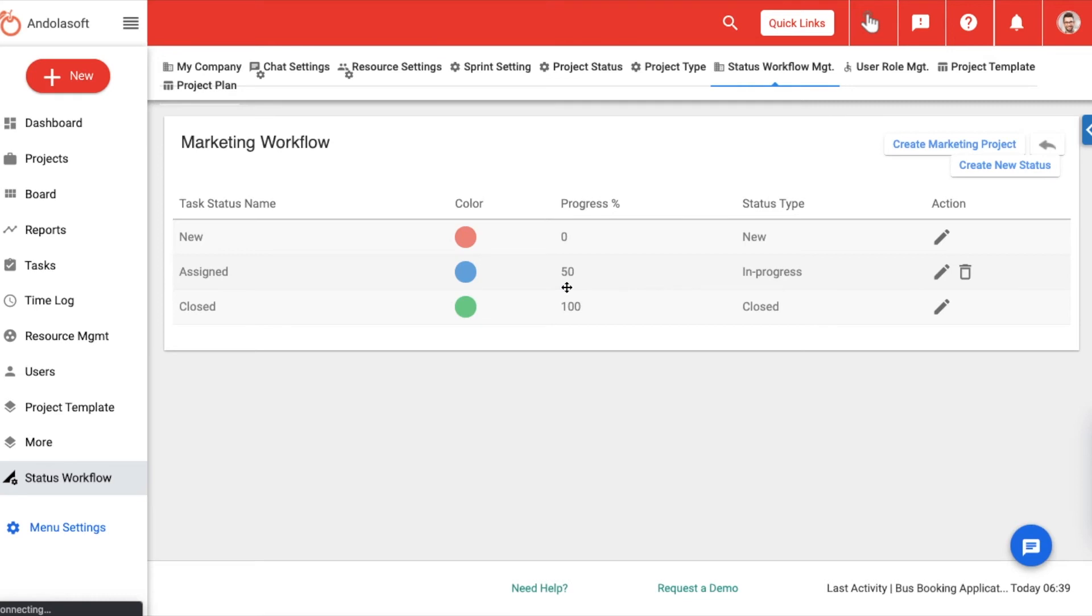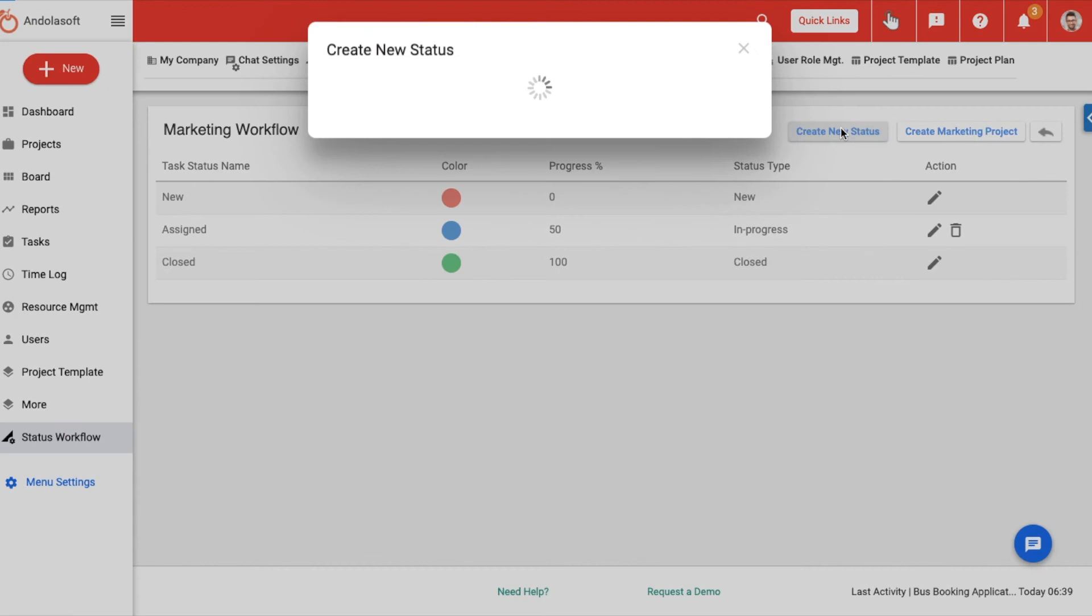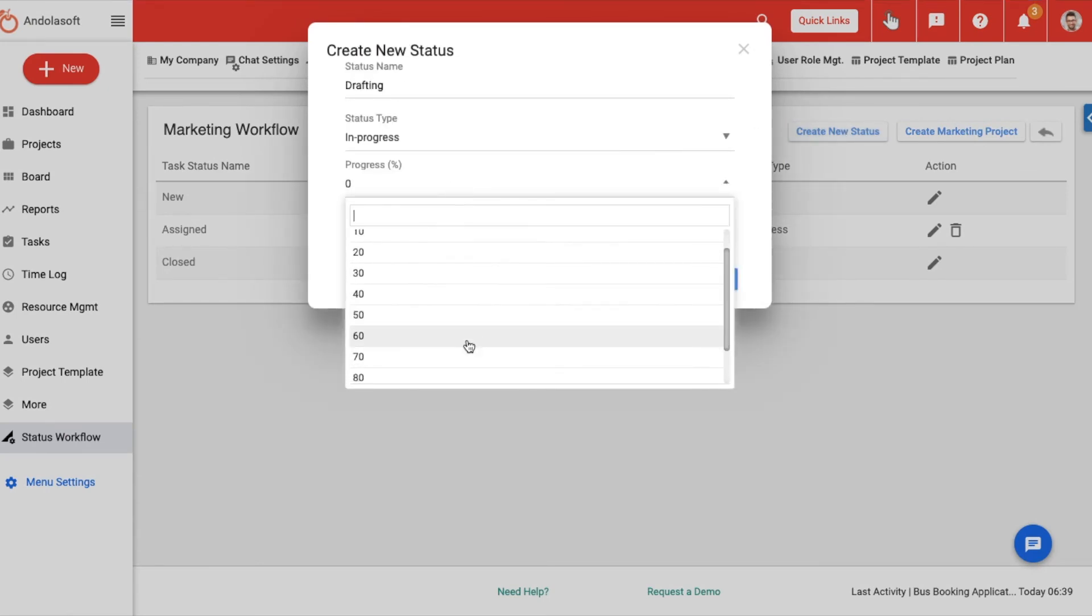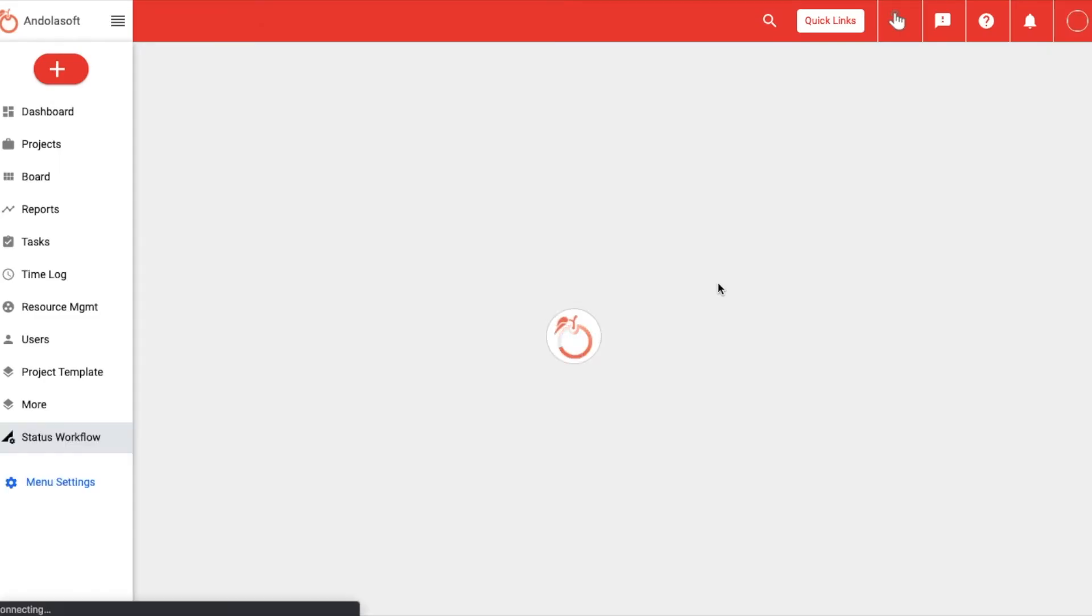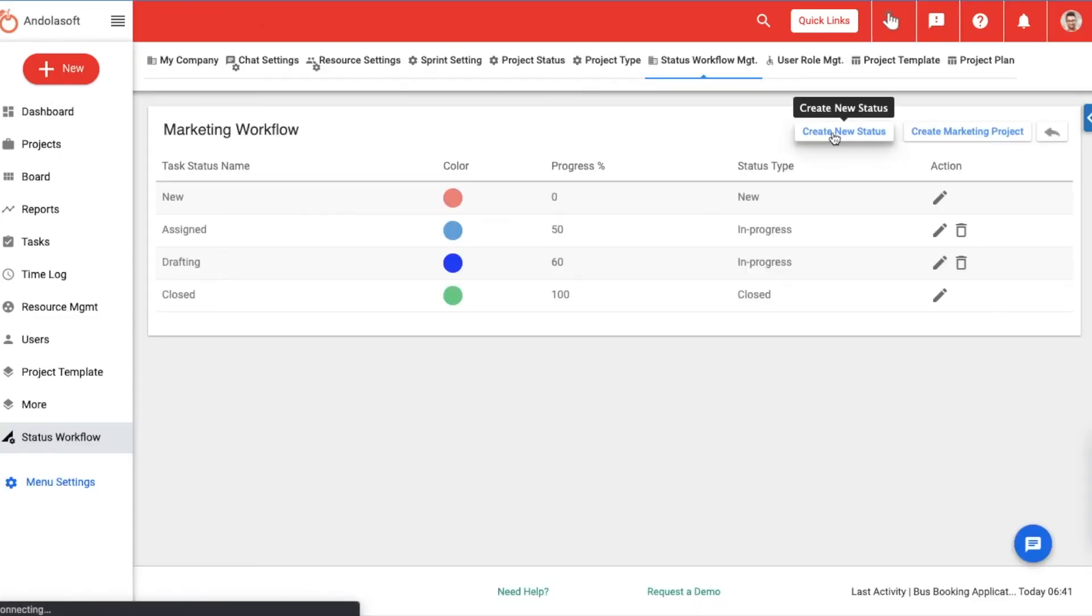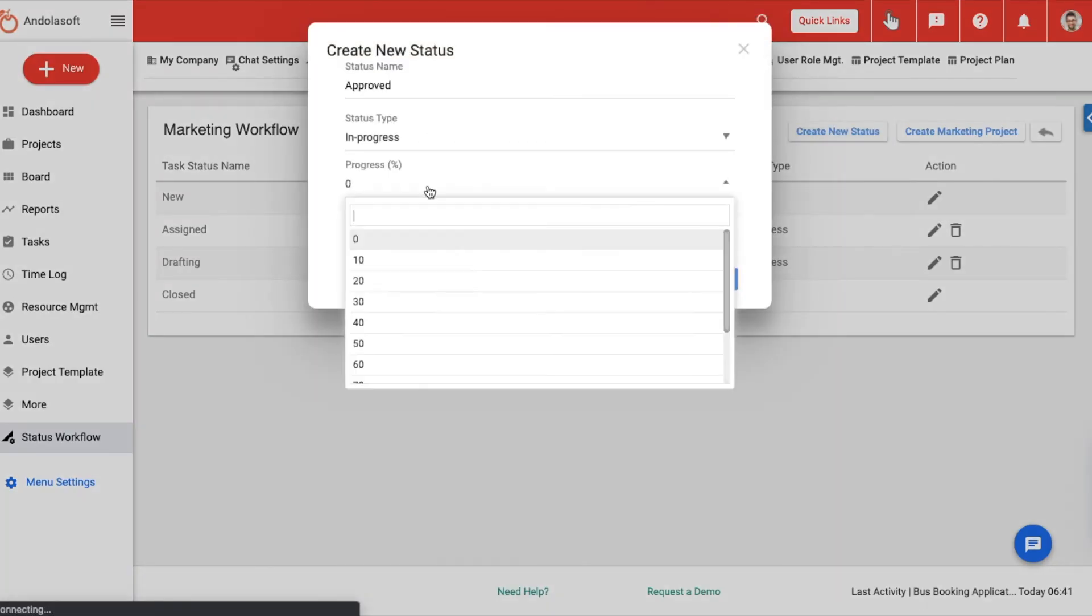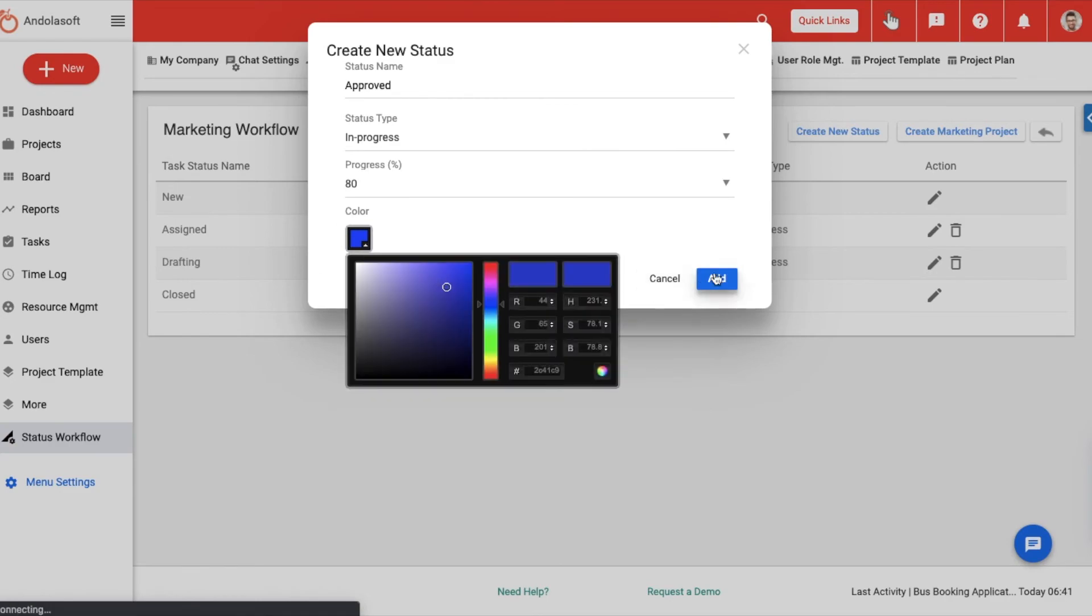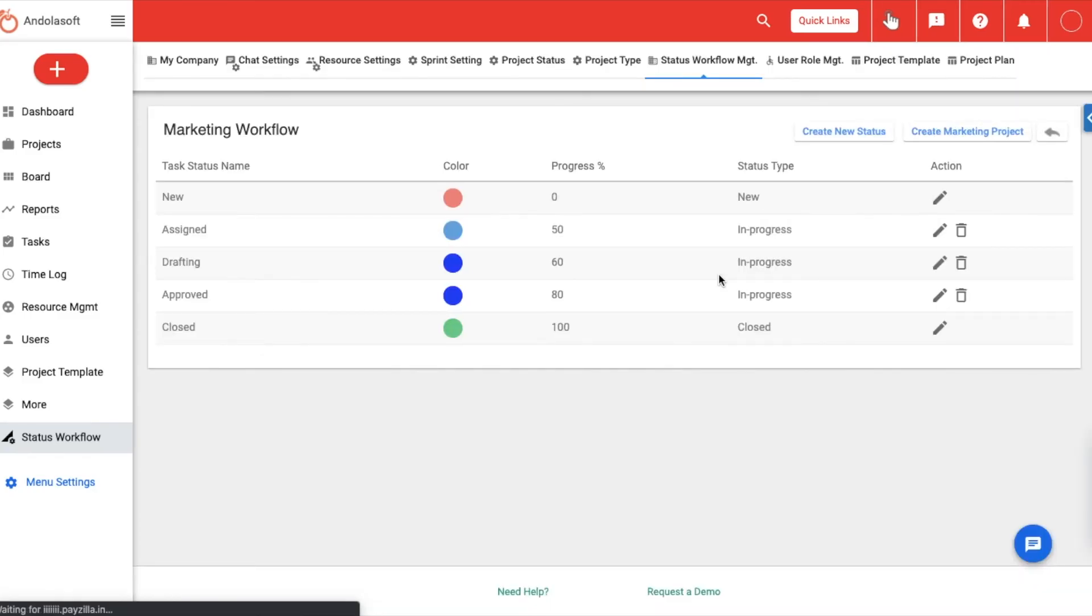After editing the existing status, you can add more status of your own by clicking on create new status. Let us add a couple of status here for better clarity. Key point to note here is, except the first status, you should always choose the status type as in progress, and choose the status type as closed when you set the last status of the flow.